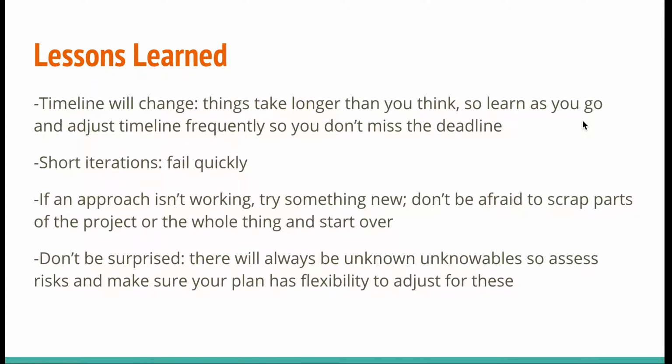So, lessons learned. Timelines will change. Everything will take longer than you think, at least in my case it did. So I needed to remember to learn as I go, and I needed to adjust the timeline frequently so I didn't miss the deadline, because things were taking longer than I planned. I should have been looking forward and adjusting the timeline more frequently, making sure that because of the changes happening to my plan, the next steps were being accommodated for and I was allowing for those changes to happen.